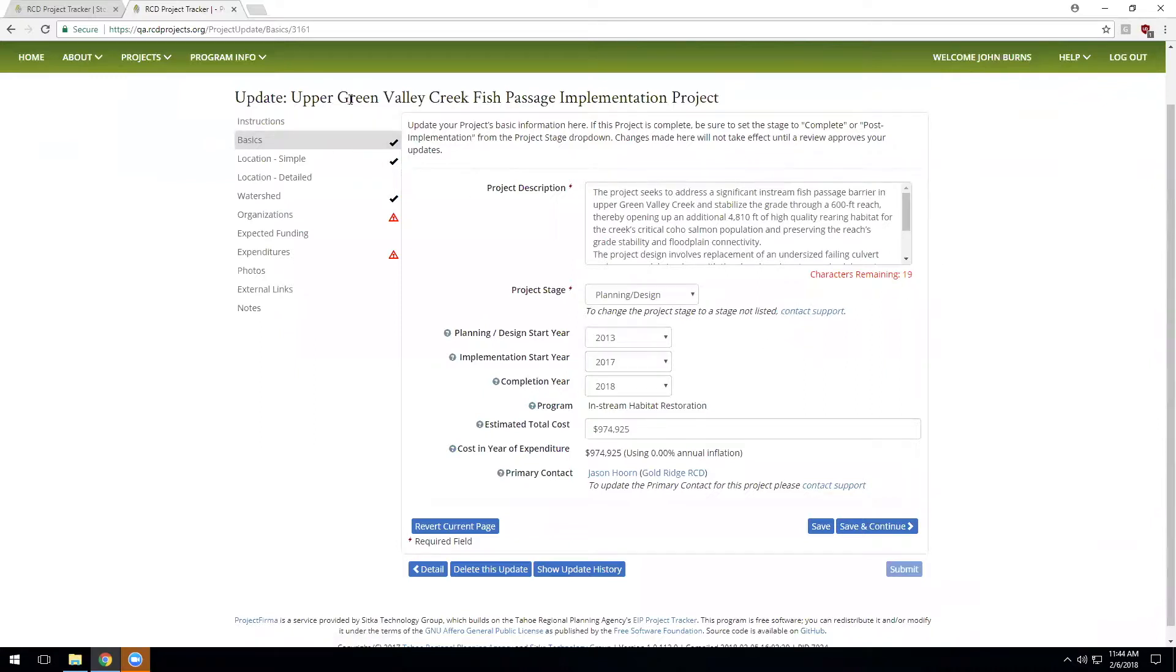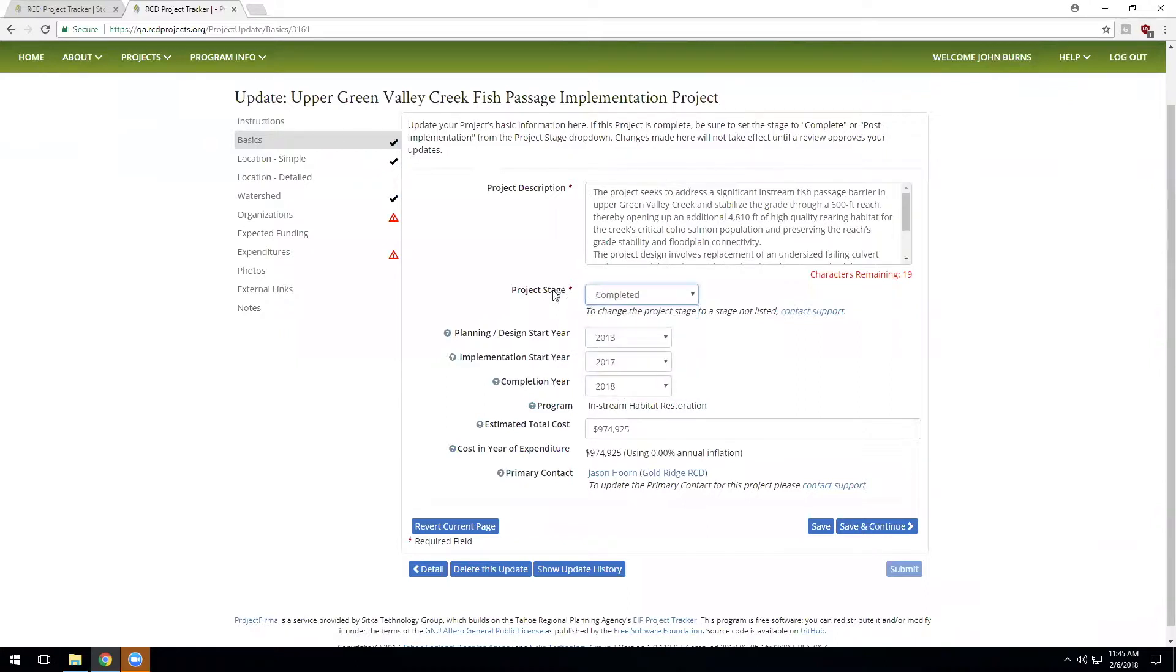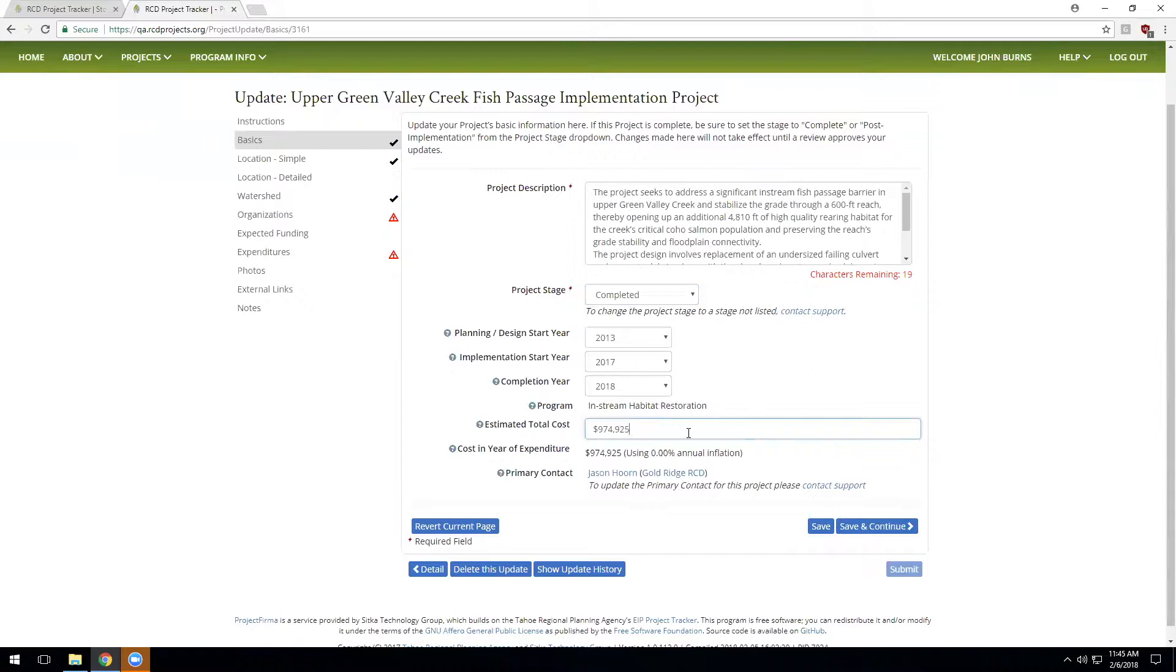So as I'm going through the Upper Green Valley Creek Fish Passage Implementation Project, this project was planned for completion in 2018. And last time this project was updated, it was in the planning design phase. Well, it's 2018. The project is now complete. So let's change the stage of this project. And let's review the estimated total cost. Last time this project was updated, we thought it was going to cost $974,000. This is a chance now that the project is complete to review the record and put in the new and final cost of the project. And unfortunately, on this example, let's have a minor cost overrun.